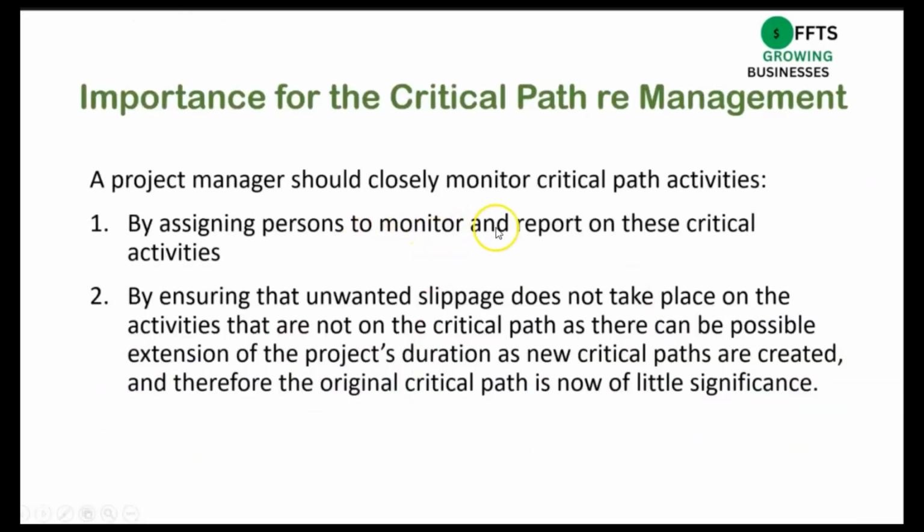A project manager should closely monitor critical path activities, by assigning persons to monitor and report on these critical activities, and by ensuring that unwanted slippage does not take place on the activities that are not on the critical path, as there can be possible extension of the project duration as new critical paths are created, and therefore the original path is now of little significance.